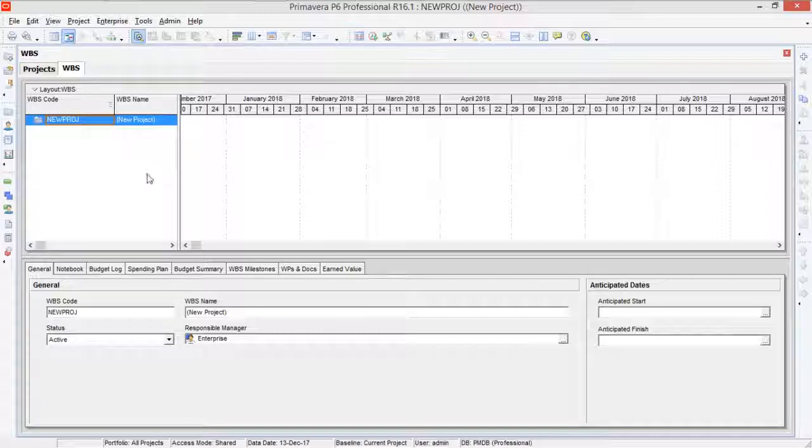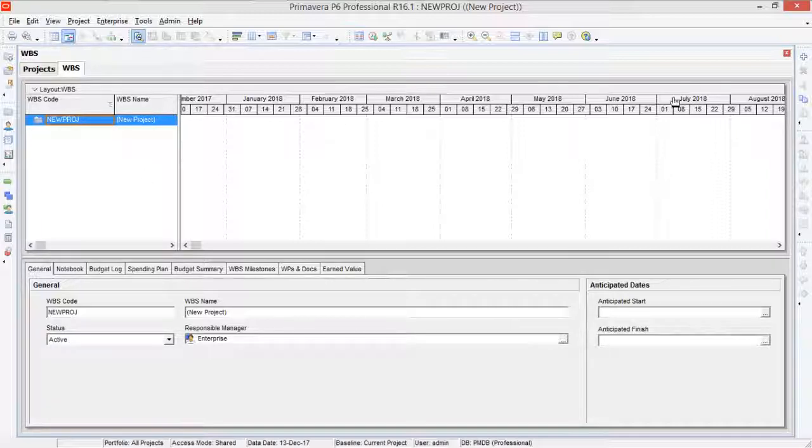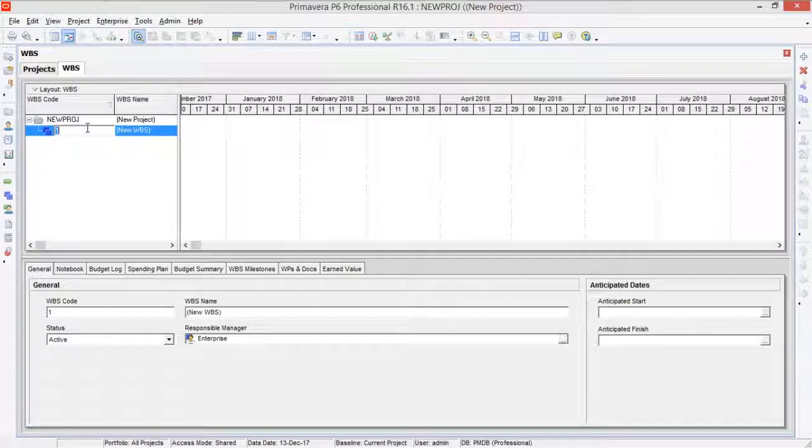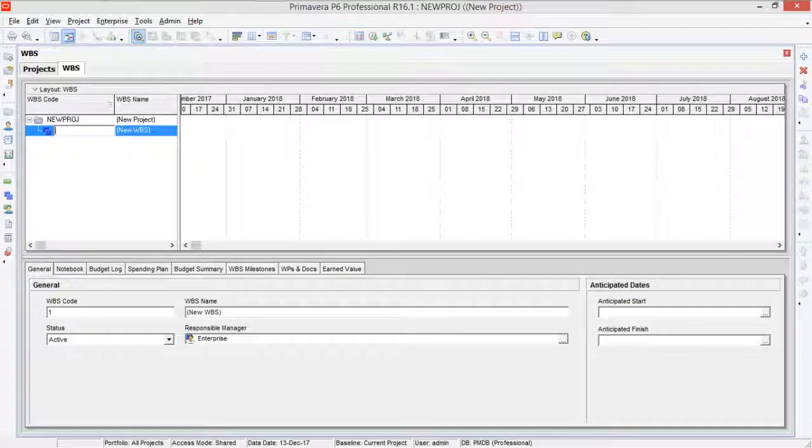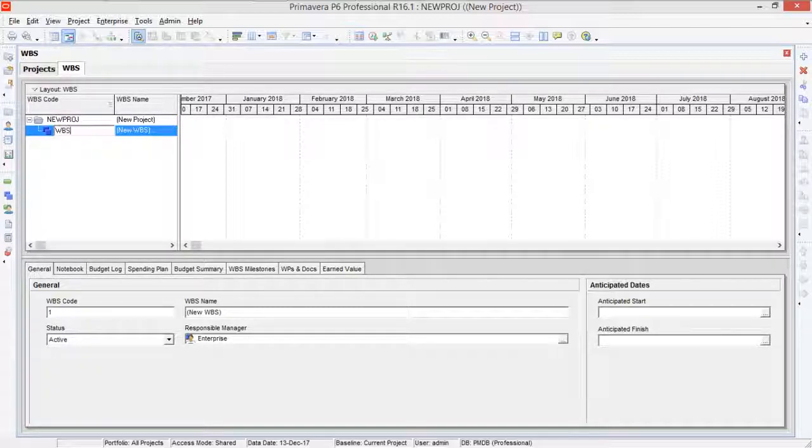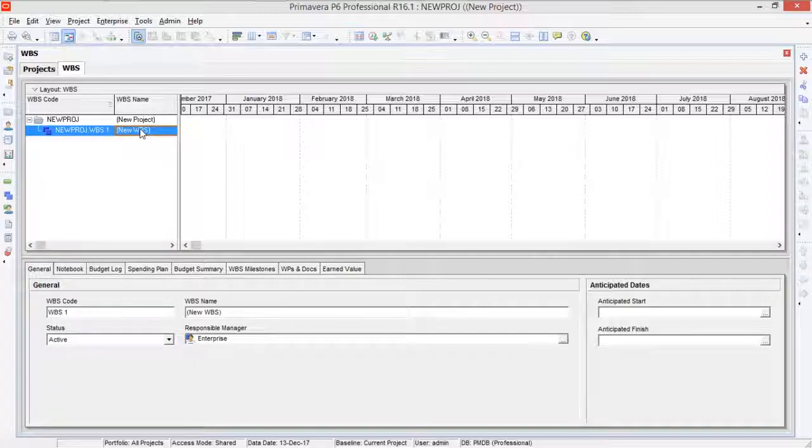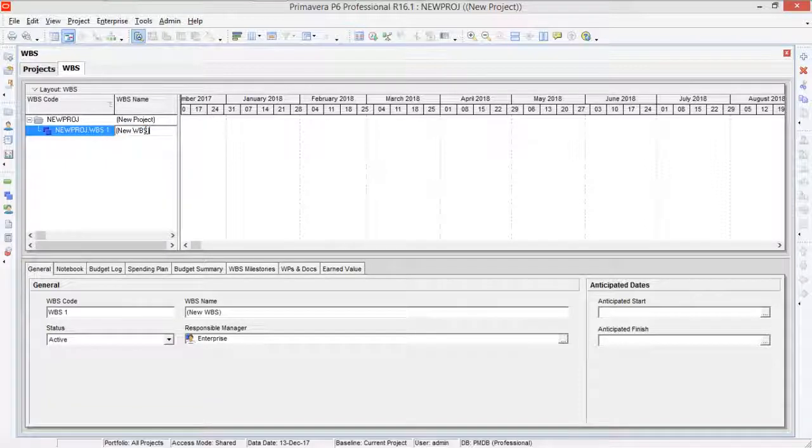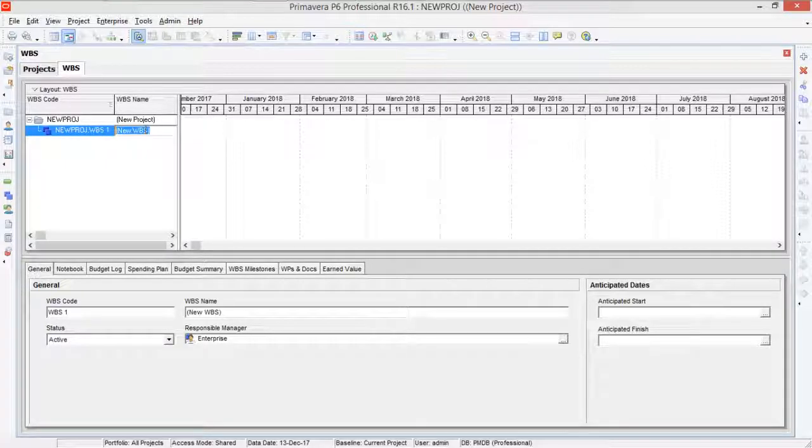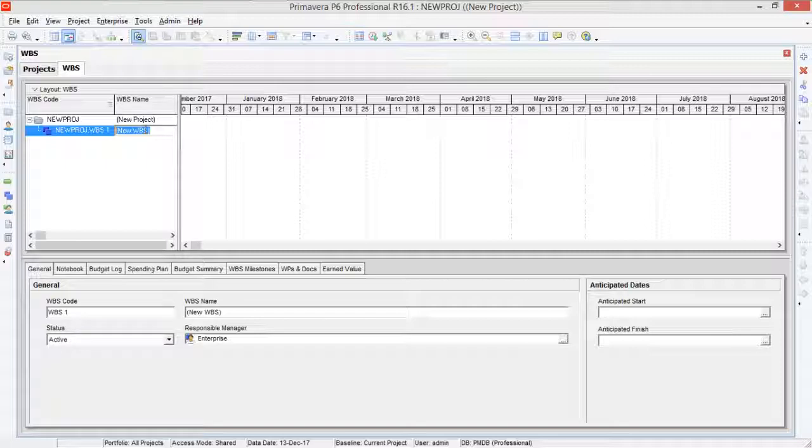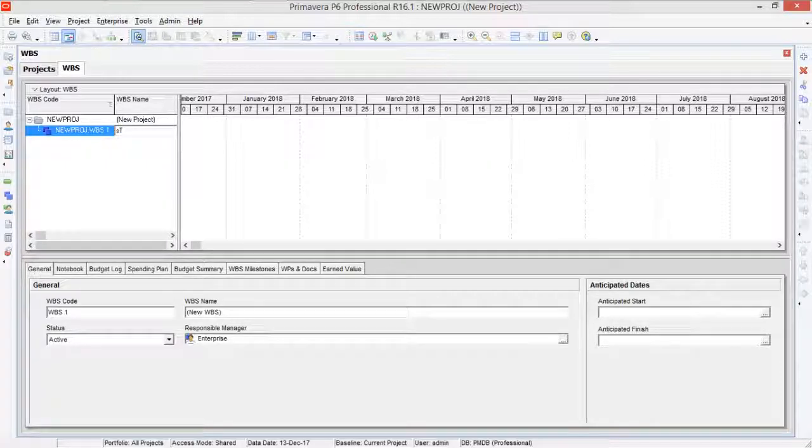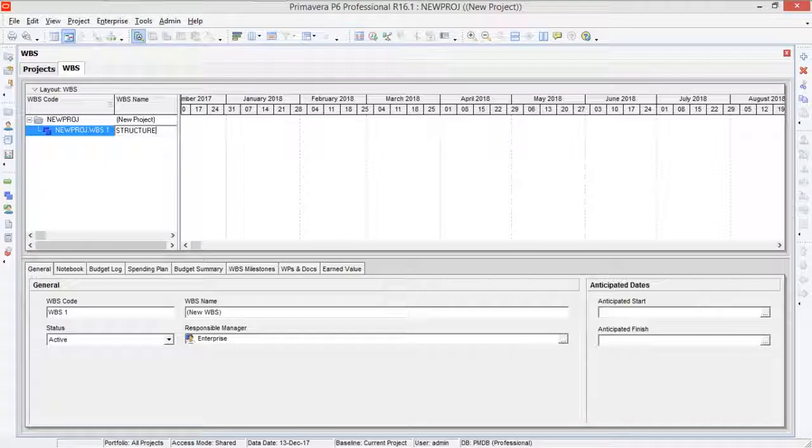In between here you have to define another WBS. For that you have to click on this add button. Let's call it WBS one and in the name you can give it a name. So let's suppose in my case you can say it as Structure.